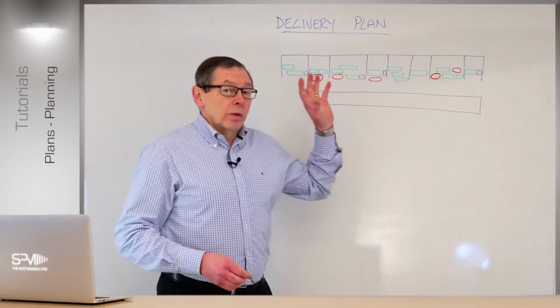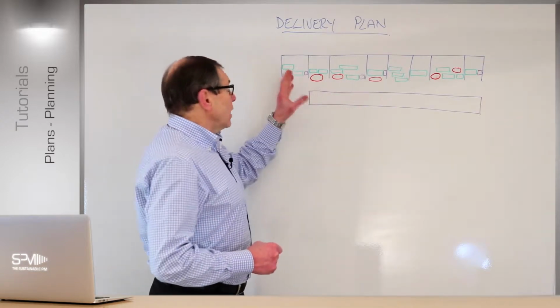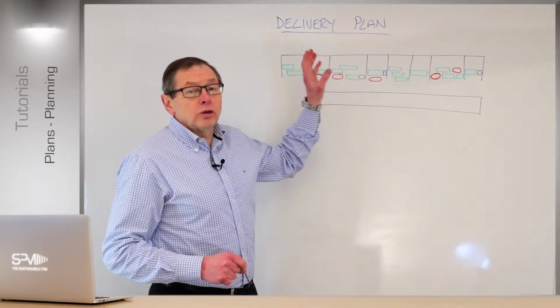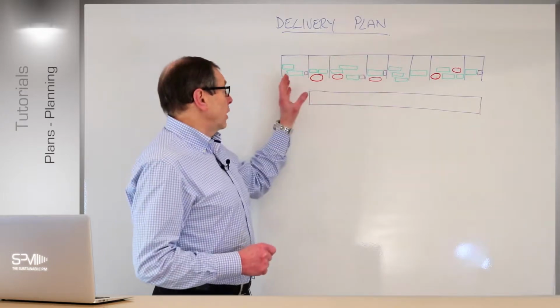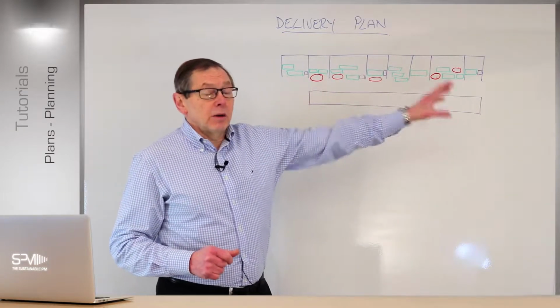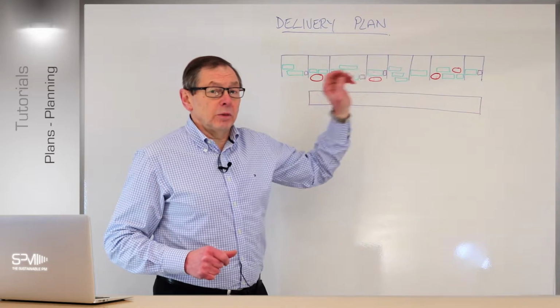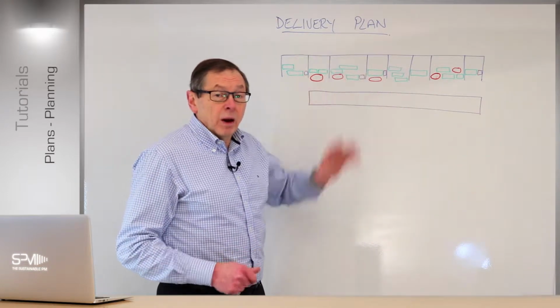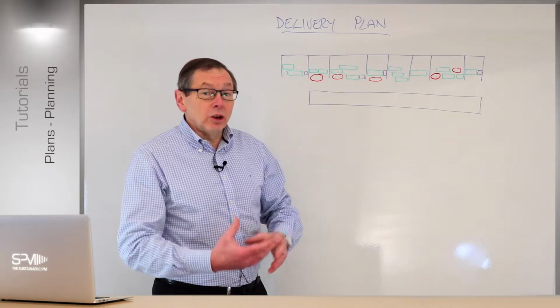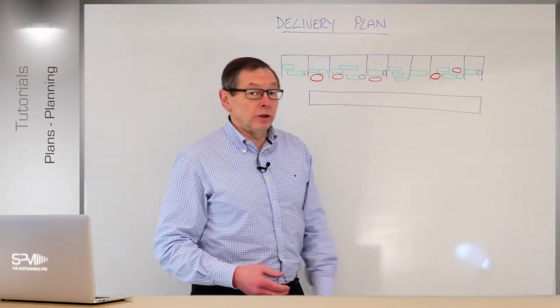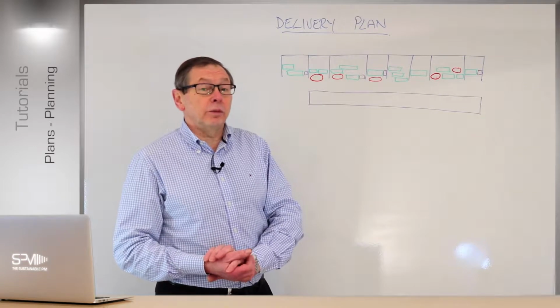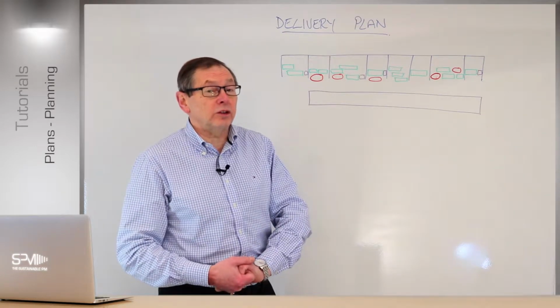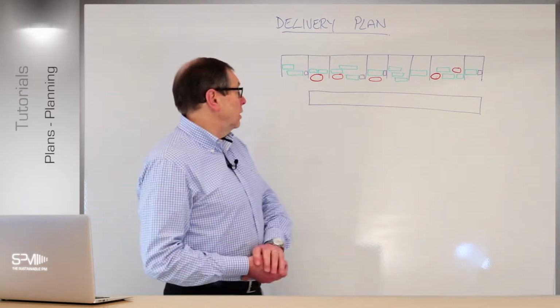The main thing to remember is that during that phase, when we've allocated requirements to our time boxes or work packages, there's more detail up front than further down the project, because those are further away, we'll wait till we get there to be more detailed about those. Then that's it, it's locked in. We need to do that so we can guarantee at this point in time the end date of the project, especially if that's critical and it's got to stay there. But we'll look at that in a moment.